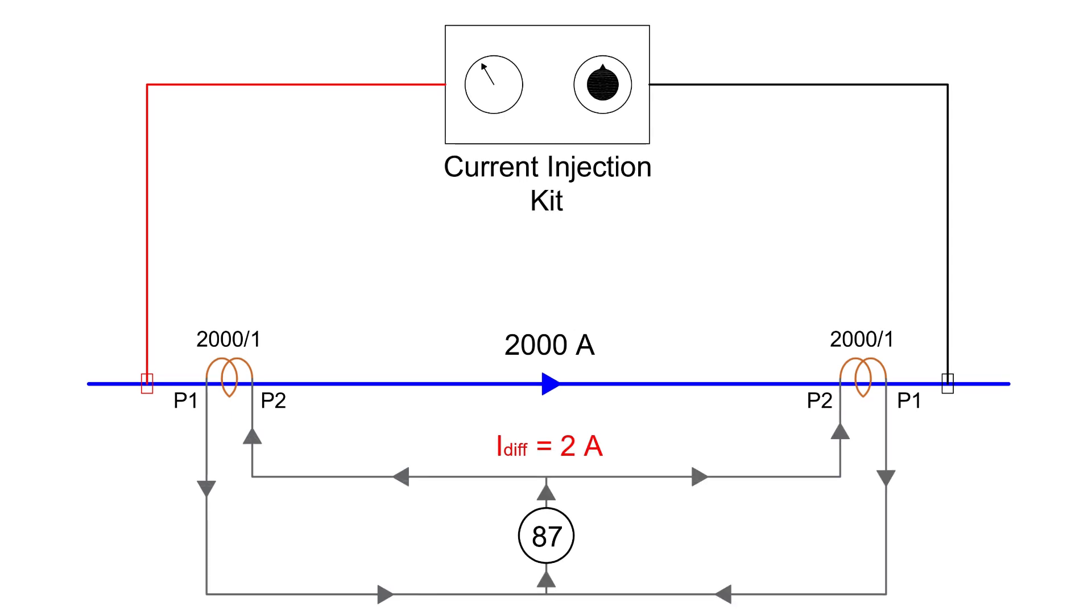However, if the differential current is equal to the sum of the individual CT secondary currents, it means the CTs are connected with the wrong polarity. This allows us to take corrective action before the system goes operational, preventing unnecessary tripping and ensuring the reliability of the protection system.